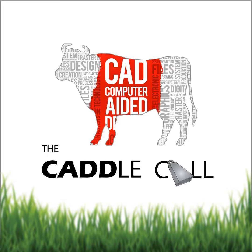And the other nice thing I think about both of these systems is that when changes need to be made, whether it's from the field or there was a design change, or the floor plans changed by the architect or the engineer, all of those tables and reports and so on, they all update dynamically. Meaning you go in, you added some new elbows, you changed some elevations, right? Your bill of materials and your costs and your pricing, all that just updates. It changes on the fly, right?